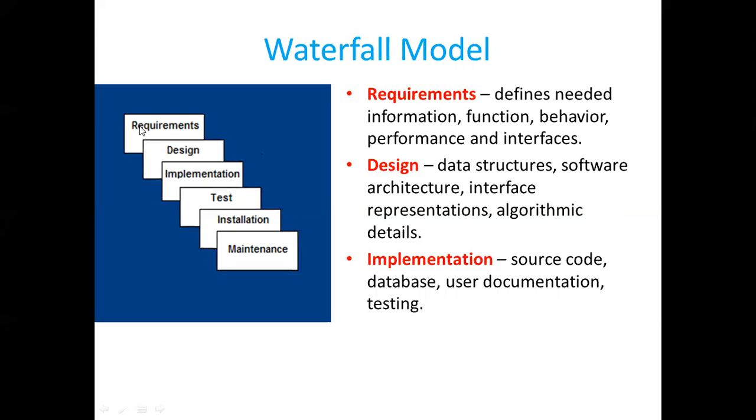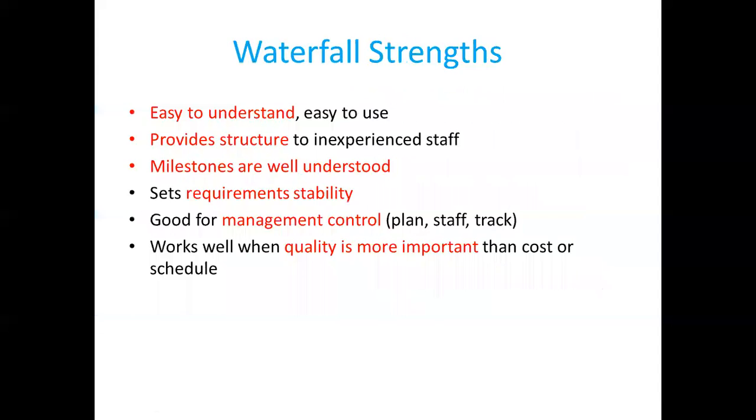Once the existing design is modified, you require to change the implementation, you require to start writing the code again. That's a big drawback of this waterfall model. Otherwise it is well and good if the requirements are known to you upfront, then you can go ahead. So the waterfall model is difficult to manage if you get the requirements in the middle of your work. That's one thing we have to remember.